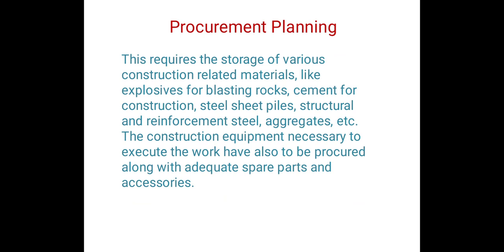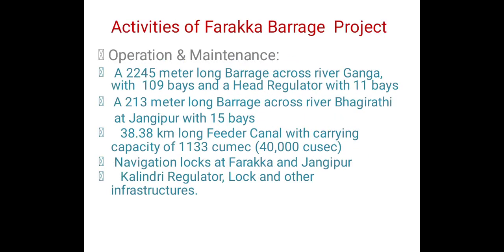This requires the storage of various construction related materials like explosives for blasting rocks, cement for construction, steel sheet piles, structural and reinforcement steel, and aggregates. The construction equipment necessary to execute the work has also to be procured along with adequate spare parts and accessories.